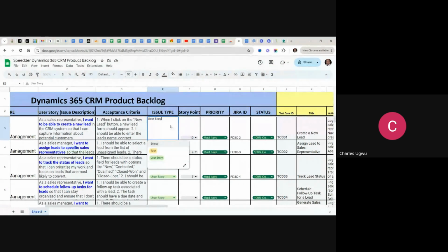During the work, every user story must be given a story point. A story point tells the complexity of that user story. How complex or how difficult is it going to be to create this user story? This will determine the amount of time we are going to give the developers while implementing or coding that particular user story.